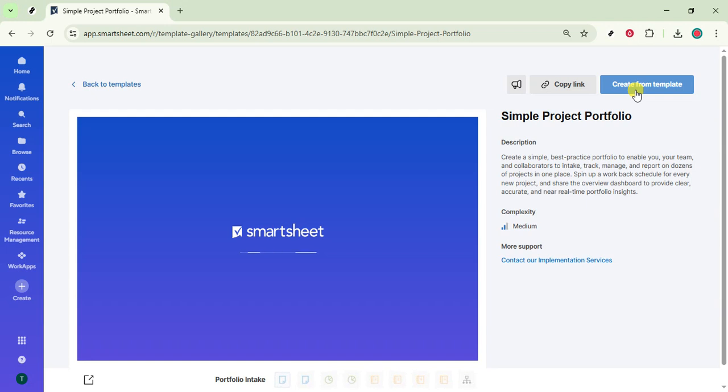Your new sheet will open with example rows, columns, and sometimes helpful notes. Replace sample data with your real information, adjust column names if needed, and remove any rows that are just placeholders. If you picked something like a Gantt template, update the start dates and ensure dependencies or timelines are set correctly in project settings. Small tweaks up front make the template work exactly the way you want.